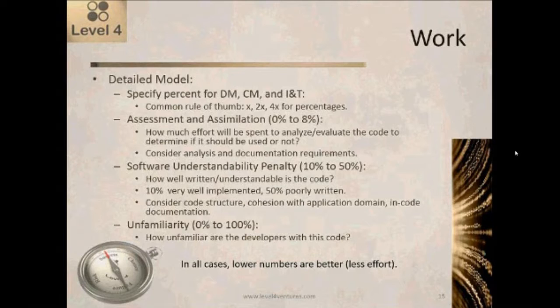And it's also the reason for this, this would also be situations where you may have to have a follow-up meeting, because you have your initial meeting, and then you go off to attack the estimate, and then you realize that, gosh, the best way to estimate this is to use the detail model. And I never really thought of asking those related questions. So I want to go back and ask a couple follow-up questions to help me apply that model.